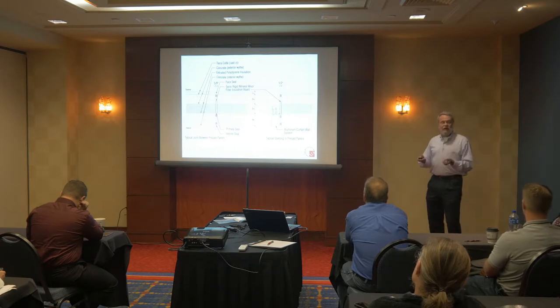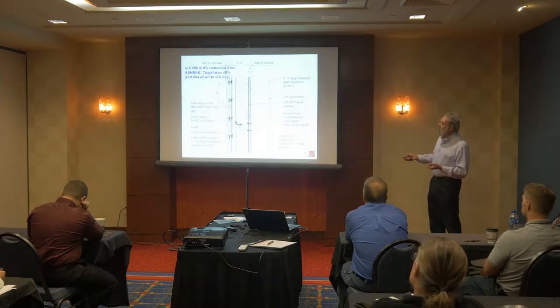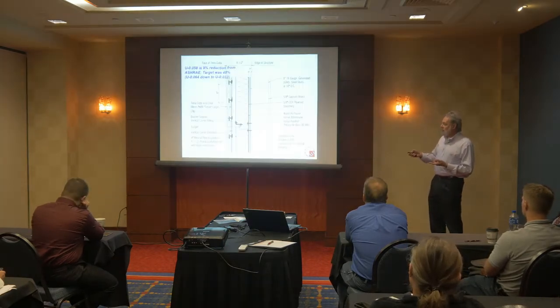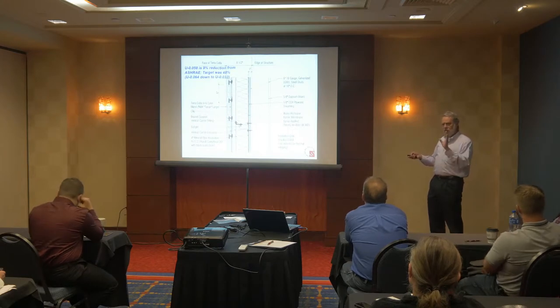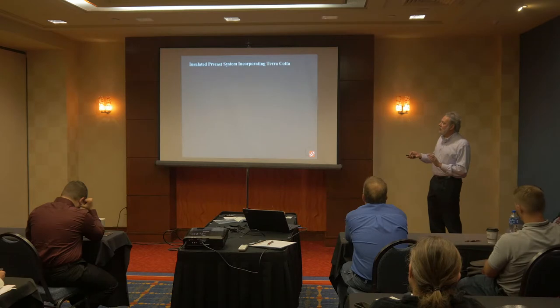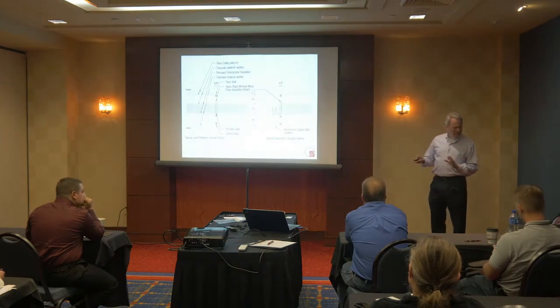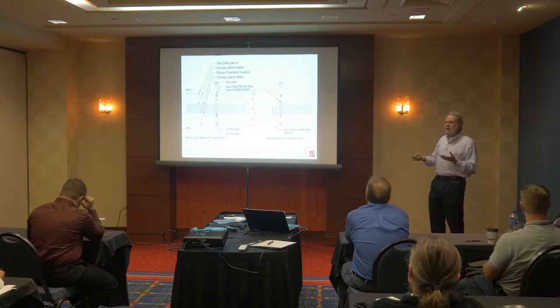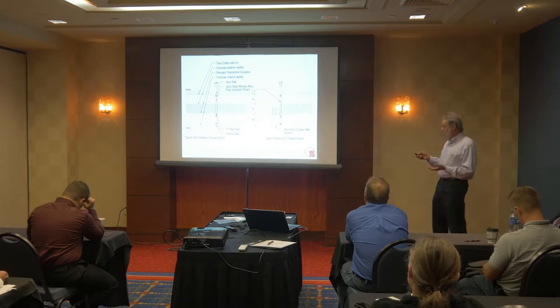And the other thing I didn't mention, that giant assembly that I was talking about just a second ago, when Dunn priced this, by the time everything was put together, we were creeping into the $90 a square foot facade cost to put that together. This assembly by itself right here, I think we ended up in the 50s, $50 installed. So we basically cut it in half. So we really improved the schedule and we cut the cost in half and we got much better energy performance. So we were very happy. So that was actually really good.